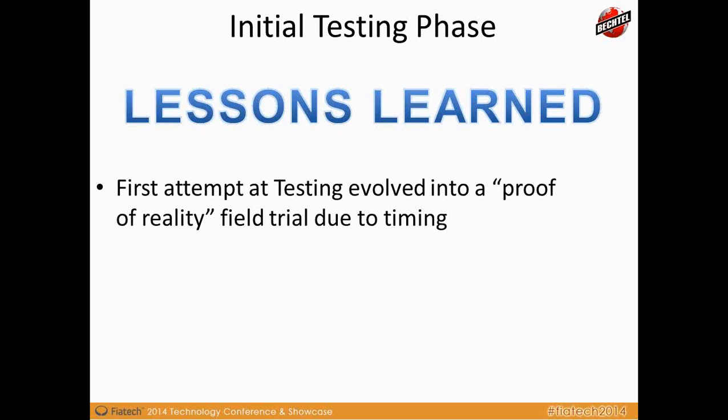If you remember what I said a little bit earlier, as we've learned over the last 2 or 3 years about our mobility environment in Bechtel in general, we've had a tendency to try and define field-based work processes in the home office. And while that sounds like a safe bet, because you would expect a number of people in the home offices with significant experience, you actually find that what the guys in the field want and what the people in the home office think are two very different things.